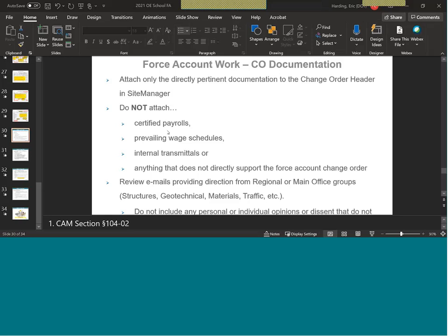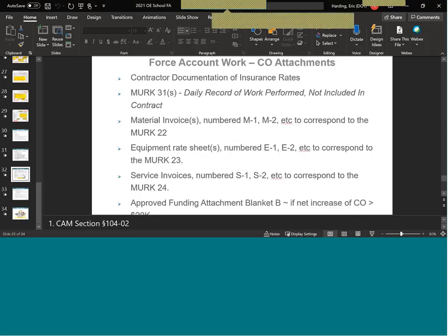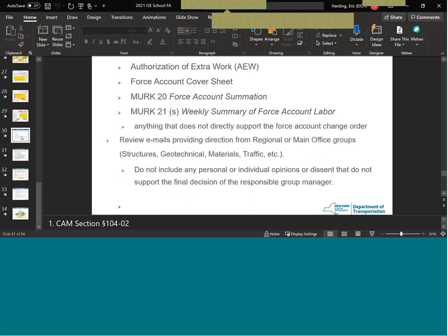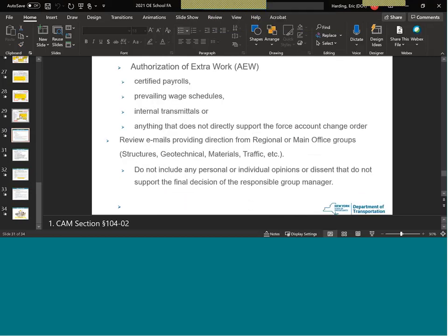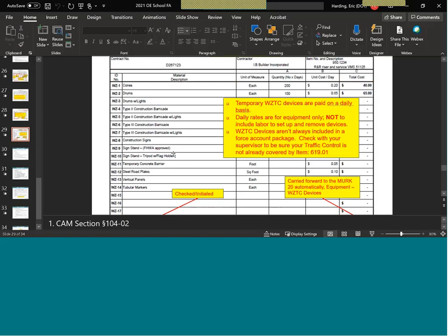All right, we have a lot of conversations going on here. I'm just scanning through to make sure that we've hit on the points that the public needs to know about. So since we do pay overhead and profit on sales tax now, that also includes sales taxes paid on the service. The 5% overhead and profit is calculated on that sales tax as well on the spreadsheets, is what I've been informed.